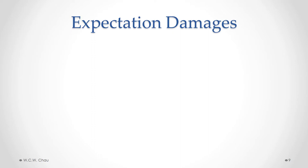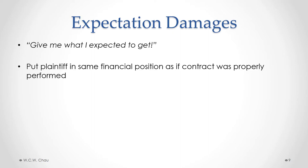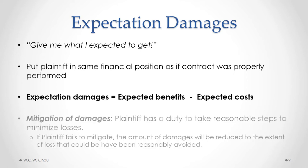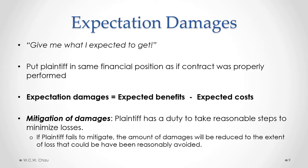Let's focus on expectation damages, which is the most common form of damages. The purpose of expectation damages is to put the plaintiff in the same position as if the contract was properly performed. The mathematical expression is: expectation damages = expected benefits from the contract minus expected costs from the contract. A key point is that a plaintiff has a duty to take reasonable steps to minimize losses. If a plaintiff fails to mitigate, a court will reduce the damages awarded to the extent that the loss could have been reasonably avoided.